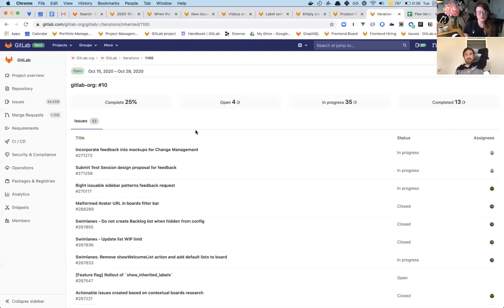Whereas in 2 weeks, it's a smaller chunk. We're breaking things down into smaller pieces. We get it out to customers a lot sooner, or in half the time. Those are the main benefits. Planning wise, it's a lot easier too, because it's just less work that you're planning for. So those are some of the main benefits of smaller iterations.